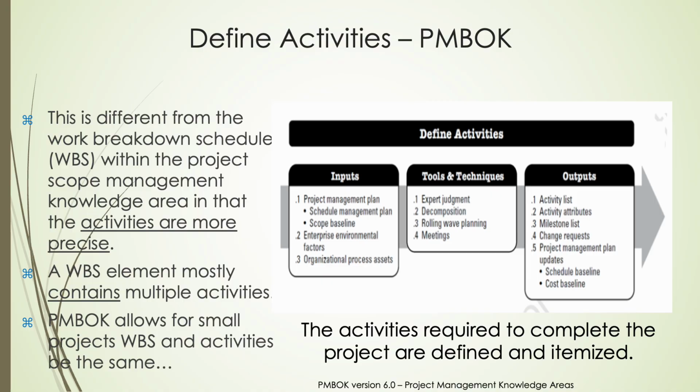However, for small projects, the PMBOK allows the WBS and the activity list to be the same, recognizing that an extra level of breakdown may not be needed. This flexibility helps tailor the project management approach to the size and complexity of the project.